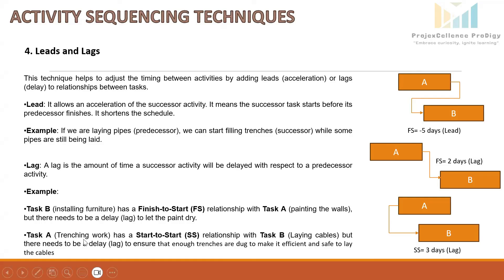Another lag scenario: task A, trenching work, has a Start to Start relationship with task B, laying cables. However, there needs to be a lag to ensure enough trenches are dug to make the cable-laying work efficient and safe.